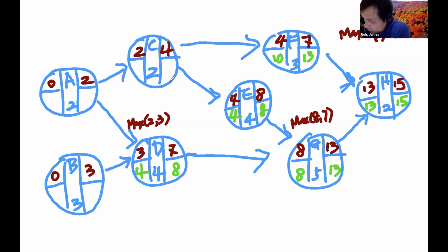And now here we have to determine the minimum of 10 and 4. And you have to choose the minimum of that. The latest time I can finish this project is 4. So minimum 4 goes here. And 4 minus 2 is 2. And here again, you have to choose the minimum of 2 and 4. And you have to choose 2 and 0. And here 4 and 1.